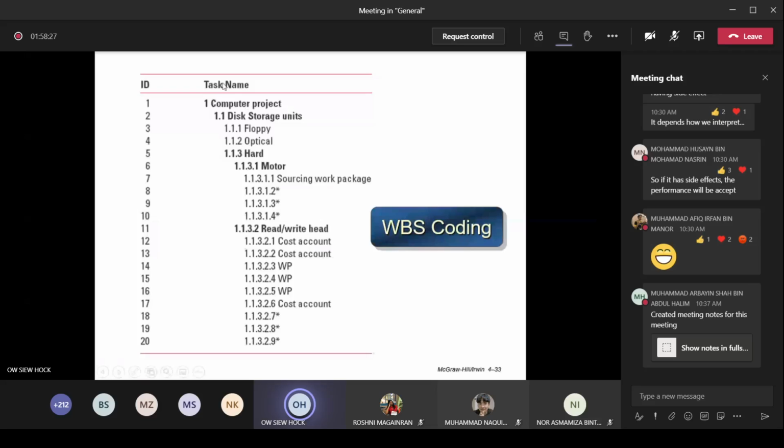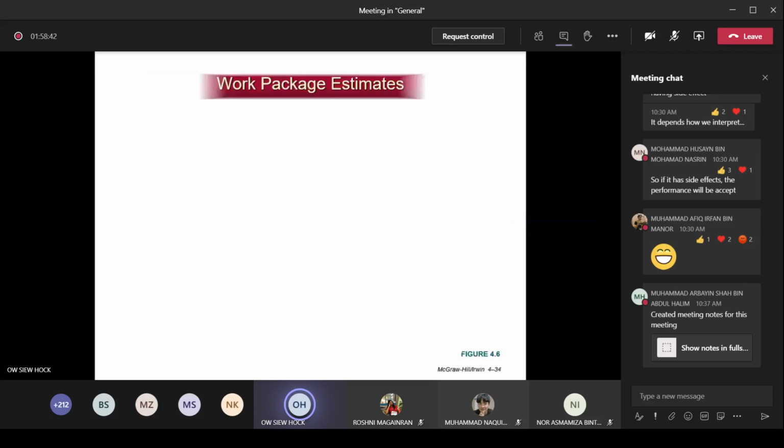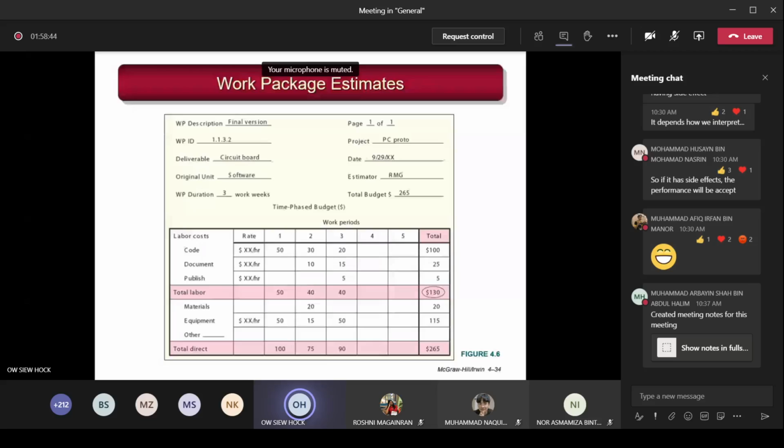So let's say the highest level, you call it the C test. Then after that, 1.1 is what? Design survey form. Let's say 1.2 is identify survey platform. You see, that's just what you had done when I asked you the question. So you can put that as your WBS. Okay? This is the lowest level.